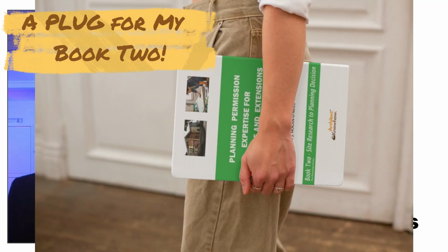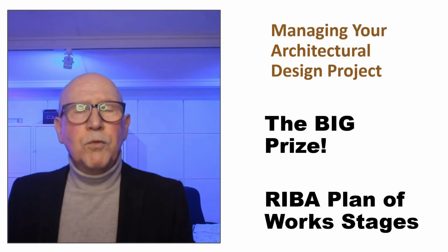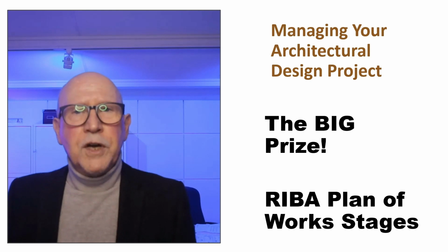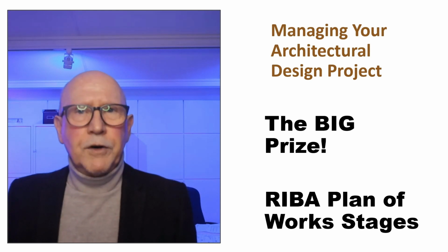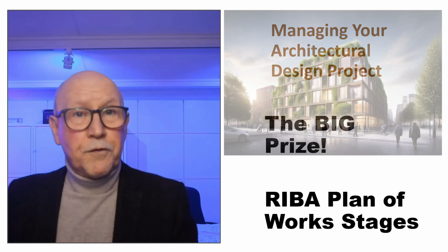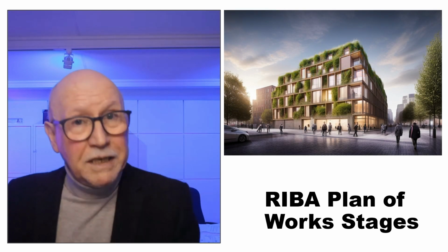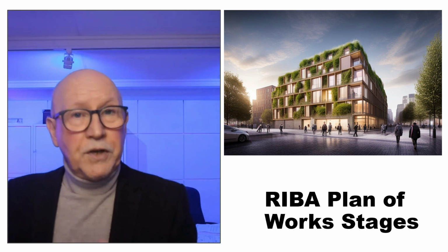They're really a good reference point. So it starts with plan of work stage 0, and your project will follow through all the work stages, ending with work stage 6, which is the project handover. And this is really when you issue your final certificate. This is a big moment for an architect because it has big responsibilities attached to it as well.